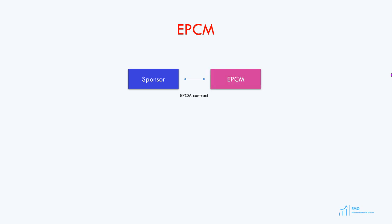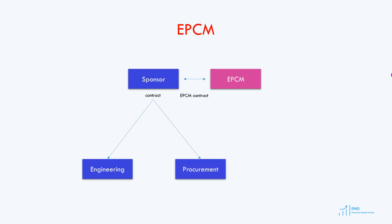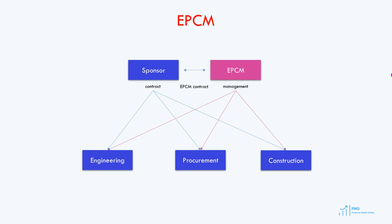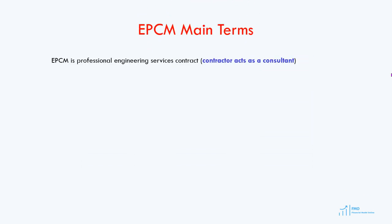Under the EPCM structure, the project company contracts the EPCM firm for engineering services, and also contracts directly with the construction company to carry out construction, and signs a supply agreement with the equipment supplier. The EPCM firm is responsible for basic and detailed design and assists the project company with procurement and construction coordination. The EPCM contract is essentially a consulting contract — this differs from the EPC contract, where the EPC firm carries out engineering, procures equipment, installs it on site, and carries out all construction activities. The main responsibility of the EPCM firm, apart from design, is to manage and coordinate equipment procurement and construction activities. Project costs in the EPCM contract are typically based on the hourly rates of employees providing engineering services.